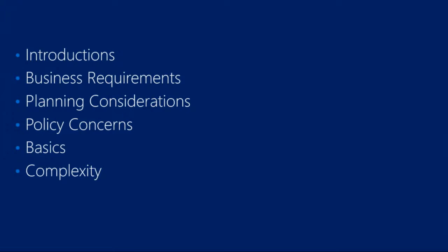If you go back through a bunch of the Gartner and IBM studies, there's like 3 reasons why IT projects fail. One of them is lack of executive sponsorship. One of the other ones is scope creep. And part of the scope creep is not defining the requirements very accurately. So I always start with business requirements. And then I work through what's the technical solution to meet that business requirement.